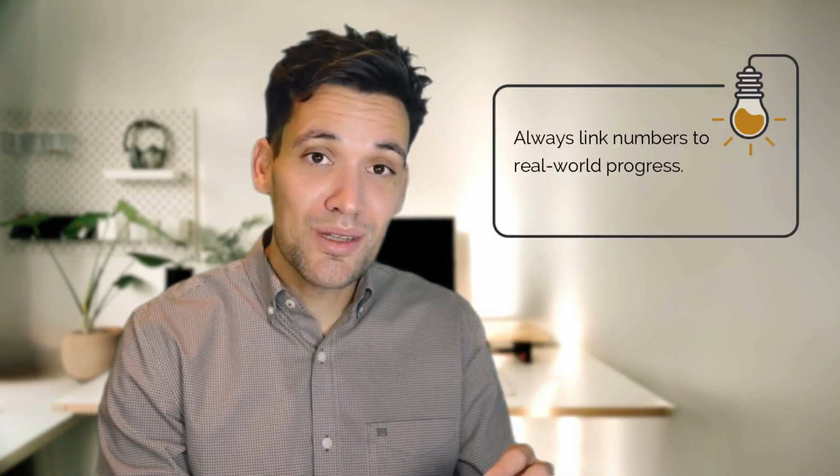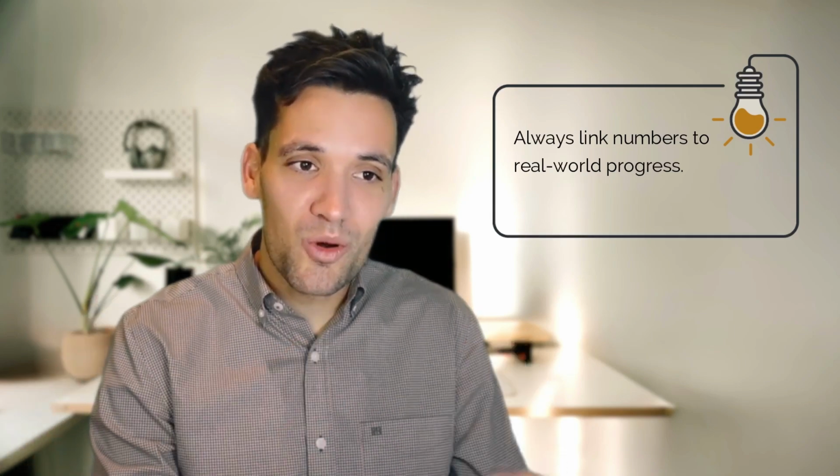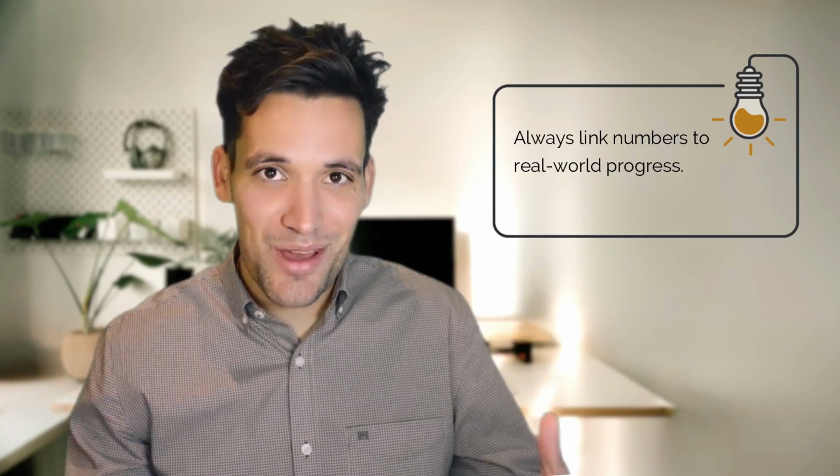For example, a task might be marked as 90% complete, but that final 10% of the task might be some sort of defect that has a 6-month lead time on the materials we need to fix it. If you looked at the schedule and you didn't understand what that 90% complete was made up of, and that we were actually looking at a 6-month delay to rectifying a defect we need to have closed out before practical completion, then you're completely missing the point. Fundamentally, you still need to have a firm grasp of how the job's actually being built, the methodology, how the data is being captured, and what it actually means. You have to understand the methodology.